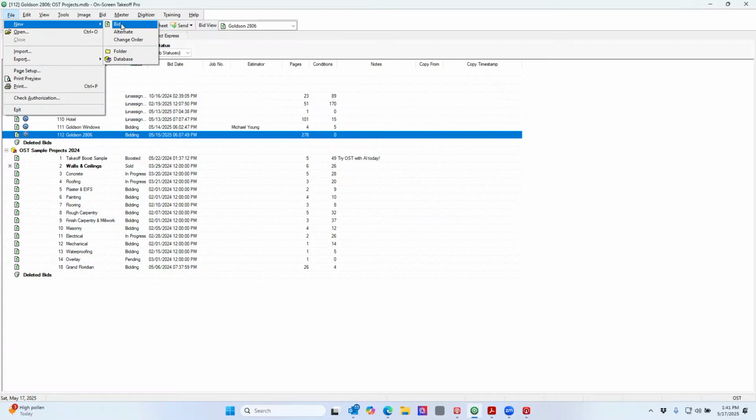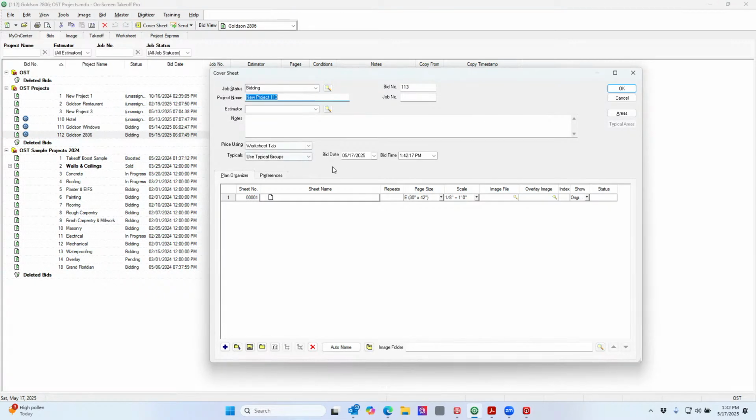Okay. So the other, alternate and change orders: let's say you had alternate pricing that you still wanted to connect to your estimate platform and you did not want it to be included in the base bid, you can actually separate your takeoff, which is a pretty cool feature. Same way with any change orders. So later on, let's say you receive the contract 2 months after the job starts, maybe you receive the updated drawing. That's where I believe it was in day 3, I talked about how you can do an overlay and it'll actually show what has changed. Okay, so you would use the change order feature for that. But for today, we're using bid just to start a new takeoff.